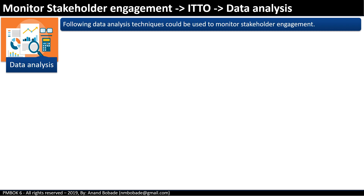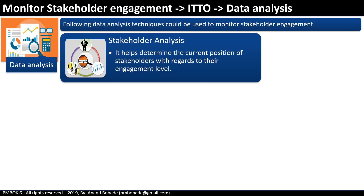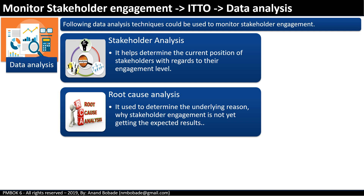Under data analysis, stakeholder analysis is a technique that helps determine the current position of a stakeholder with regard to their engagement level. If the current position is not yet aligned with the desired level, you need to decide what steps to take to bring them into alignment.